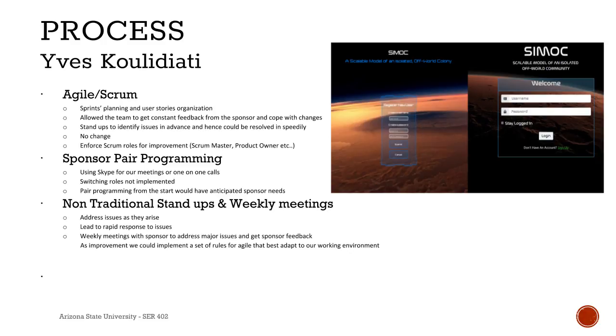Sponsor pair programming design. A process that helped us better work toward the design our sponsor had in mind for the project was pair programming design with our sponsors. Engaging in this style of pair programming from the start would probably have resulted in a much quicker realization of the needs of our sponsor. The time spent working on a game style interface would have probably been discarded in favor of the dashboard much earlier on in the process.